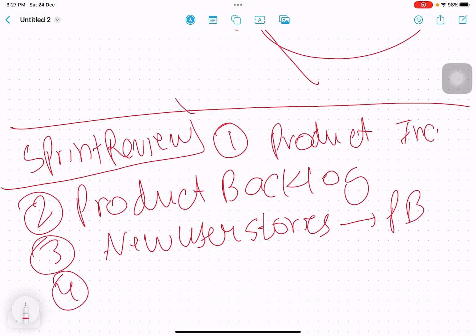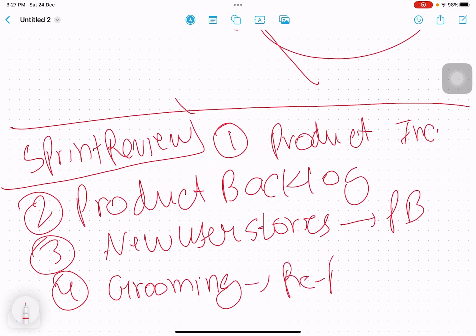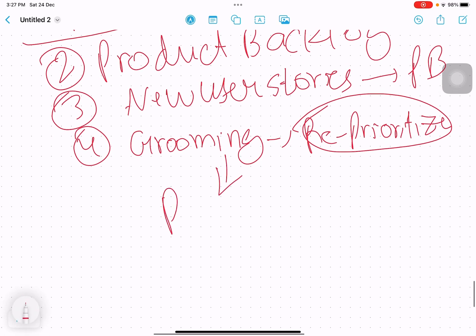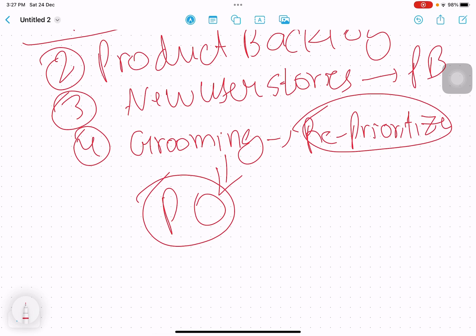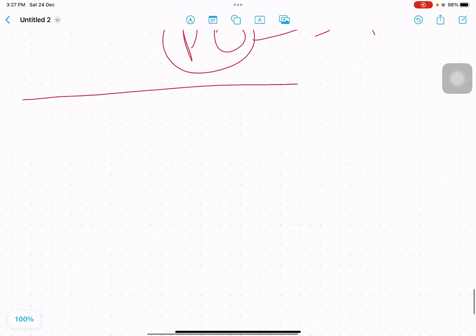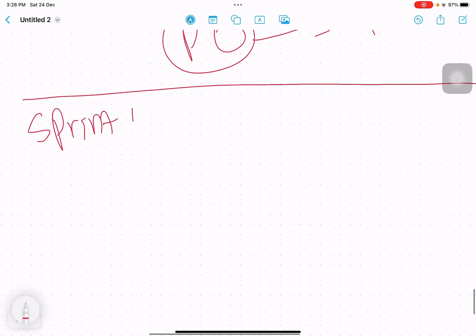Since the previous sprint backlog is over, every sprint gets a new sprint backlog. During the sprint review, we also do grooming of the product backlog, which means reprioritizing it. This is the product owner's job. Since the customer is present, they may add more user stories or some may be rejected or incomplete — all of those go back to the product backlog and it gets reprioritized.